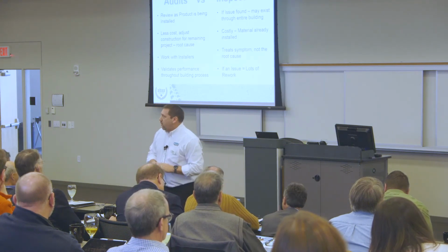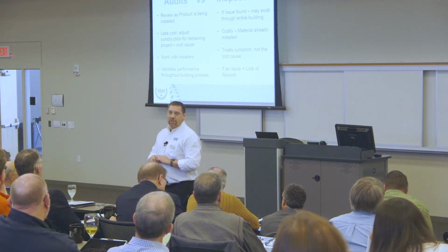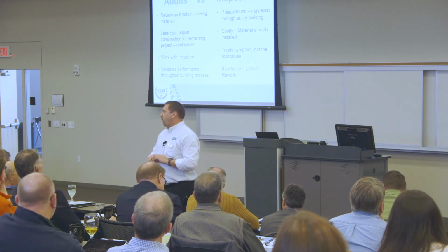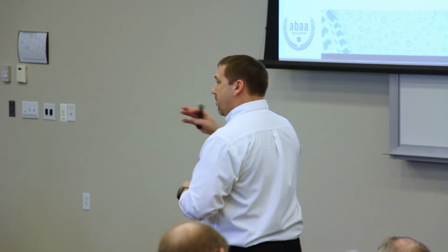Yep, he got it. We went out, 6 months later, tested those windows. 88 windows were installed. 1 day of testing, 4 of them failed. They pulled all 88 windows out. Real life, that sucked. I wish he had been audited. I wish somebody had come in early, talked to him. I just sent him the email, but I wish somebody had gone and said, hey, we need some testing early. We need to make sure things are going in properly at the beginning, right?